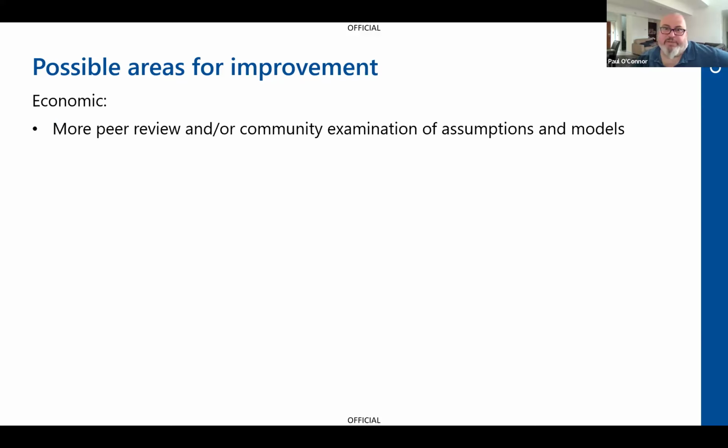There's a famous professor in the UK called Professor Bent Flyvbjerg, and he has written a lot about mega projects and risk. And he has a view that the main reasons why projects go over time, over budget, is due to, well, he says there's two components. First one he thinks is delusion. So everyone becomes delusional about a project because they're so excited and they want to achieve it. They can't see, it's called optimism bias. They believe it's much easier to achieve. He calls that delusion, and he calls it deception.